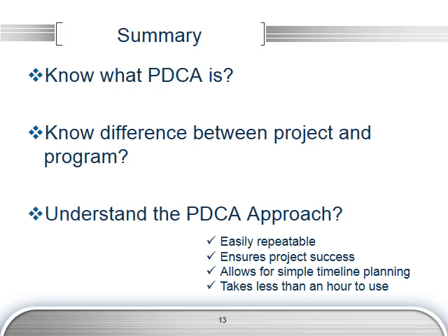One of the things I've done with multiples of these PDCA plans is I take all of the action items listed in the P, the D, the C, and the A and line them up in an Excel spreadsheet, and to the right of them I put a start date, an end date, and a POC. This way I now have a schedule aligned to my project plan. And if I have multiple projects going on that are all related to one thing, it becomes an integrated master schedule.